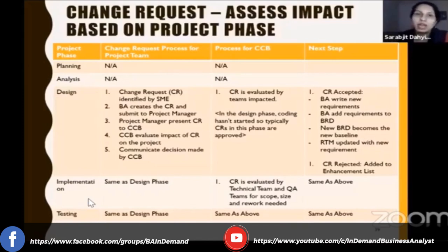The only difference with Agile is that changes come in either as defects or new requirements on the product backlog, which is then prioritized and moved into upcoming sprints if the items on the product backlog are prioritized high enough. Could you just go over it one more time?